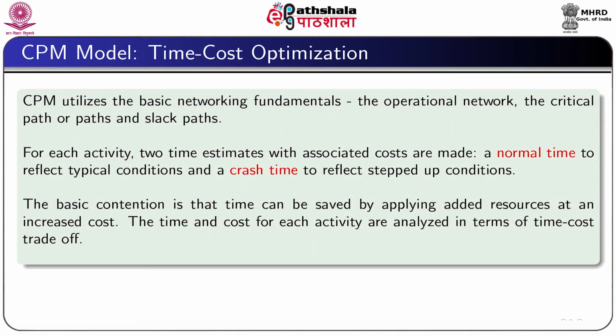Now, we proceed to discuss the CPM model with time cost optimization. CPM employs the basic networking fundamentals: the operational network, the critical path or paths and slack paths. Two time estimates with associated cost are made for each activity, a normal time and a crash time.